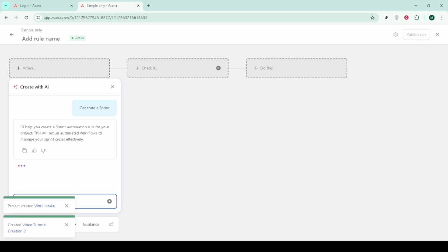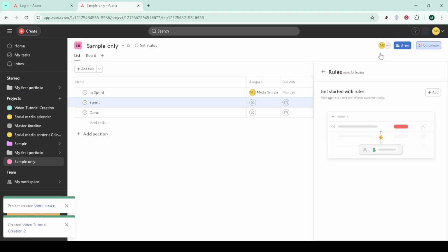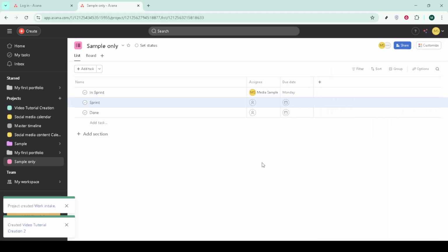Finally, keep completed tasks in the sprint project for historical tracking and use filters to hide done when you want a cleaner view. This preserves your delivery record, supports metrics like velocity over time, and makes it easy to revisit decisions later. That's your end-to-end Scrum setup in Asana: simple, visible, and easy to maintain.